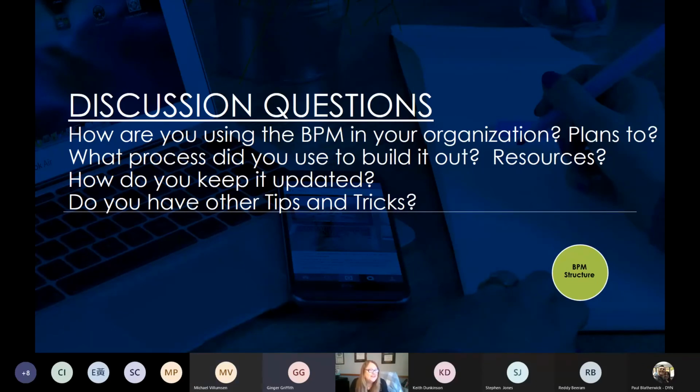One other comment on the maintenance piece. We don't tell our implementation teams that the BPM is everything you need. We tell them it's maybe 80%. If it's missing something, their expertise needs to come in and build that out. To varying levels, we've been able to pull some of that content back. If they find something not in the BPM that they needed on a given project, we try to capture that information and bring it back into the business process model so other projects can benefit from that knowledge as well.